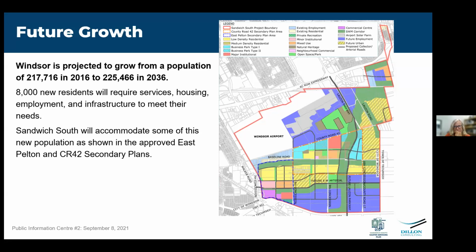You're on mute though. Yeah, sorry, I keep muting myself when I'm not talking. Your question is a good one. You're right. In terms of what's needed for the SWM facilities specifically, at the completion of our study that's only going to get answered with certainty for the 2 secondary plan areas, because those are the 2 areas that were satisfying Schedule B requirements under the Class EA process. The other areas, it's going to identify the corridor still, but it'll be subject to a similar future Schedule B requirement and/or public consultation to refine the corridor widths for the other areas.